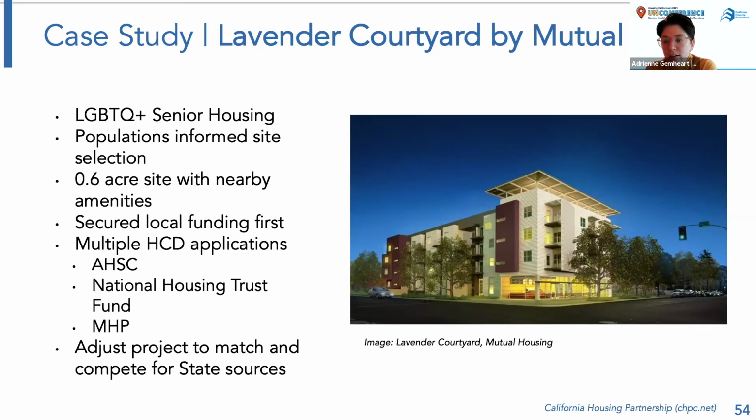Also, the zoning really dictated a lot of the design. So Mutual Housing decided to go to the full 4 stories that were permitted with the zoning, and were able to fit about 53 units on this site. After working with the architect to flesh out the design, we then went to the contractor to get an early construction estimate, and really started to develop the budget to figure out what kind of financing we'd pursue given the design limitations and the site.